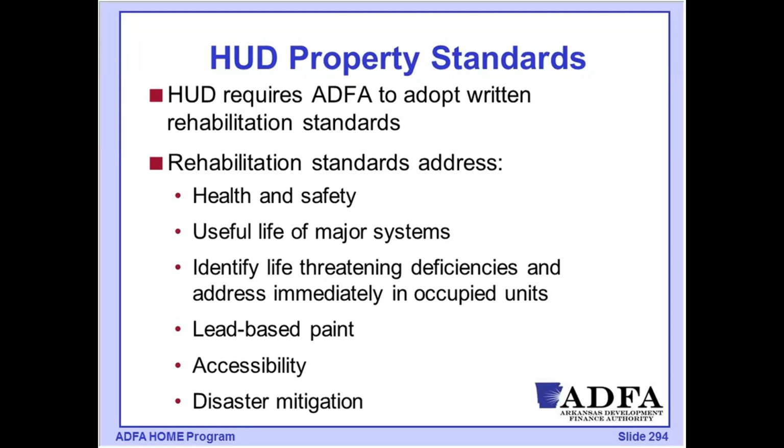And so that triggers the requirement for appropriate risk assessments to be done to determine the level of lead hazard in that property, and then specifying the level of treatment that would be required, whether that's as simple as lead-safe work practices on some minimal disturbing of painted surfaces, all the way up to complete abatement for that unit.